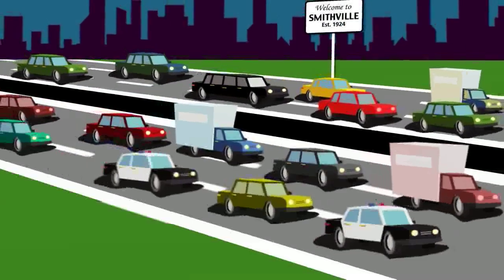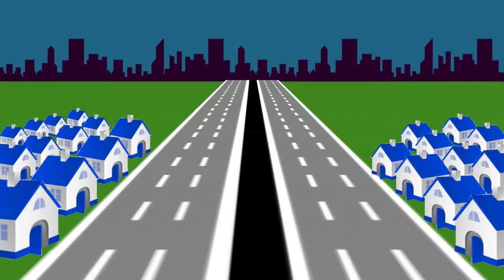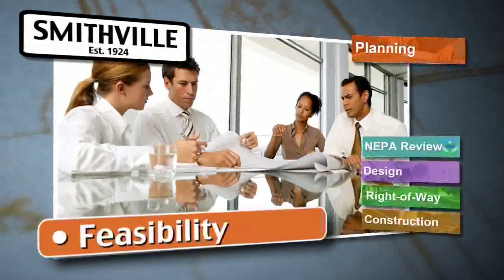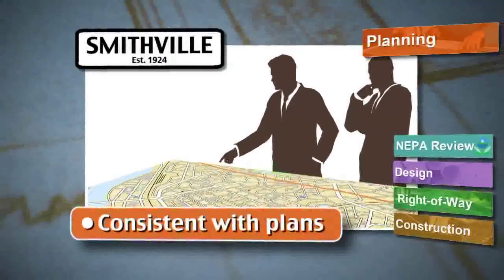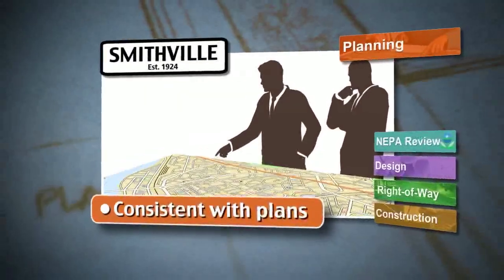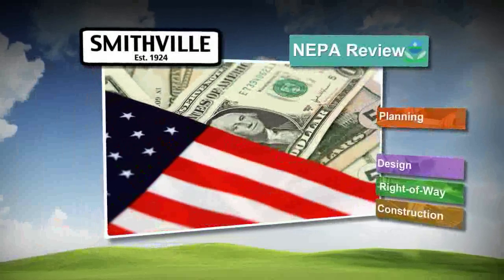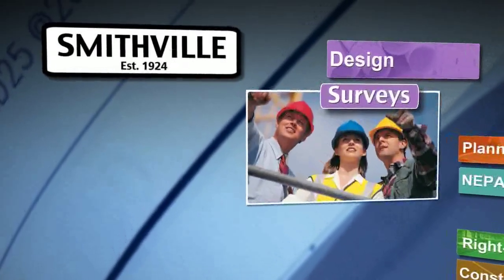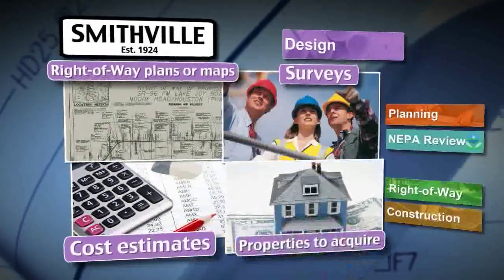To relieve congestion of its secondary roads, the city identified that it needed to extend a 6-lane highway from downtown to the suburbs. In the planning phase of the project, the city assessed the feasibility of the project, determined a funding mechanism, ensured that the project was consistent with the state and metropolitan area's transportation plans and programs, and completed the NEPA process. Because the project required federal funding for the right-of-way, the city is following federal regulations and state statutes. In the design phase, Smithville completed the surveys, prepared right-of-way plans, performed cost estimates, and determined which properties to acquire for the project.